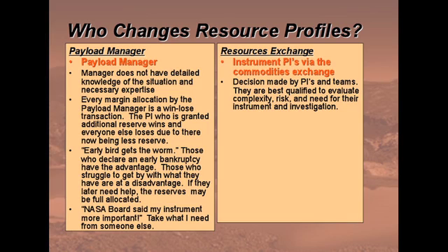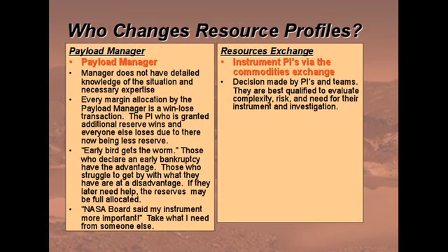The additional problem is every margin allocation out of his account is a win-lose transaction. If you get the margin from him, you win. Everyone else loses because available margin goes down. And should they need it later, it may not be there. This leads to the early bird gets the worm syndrome.